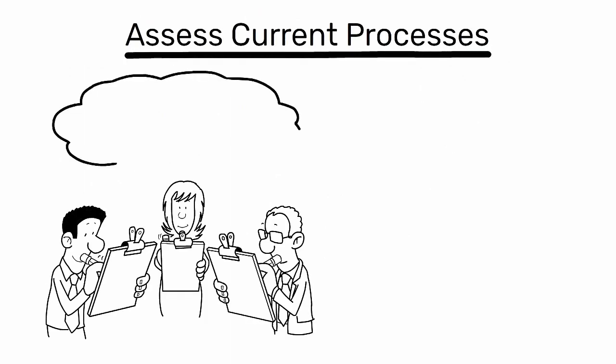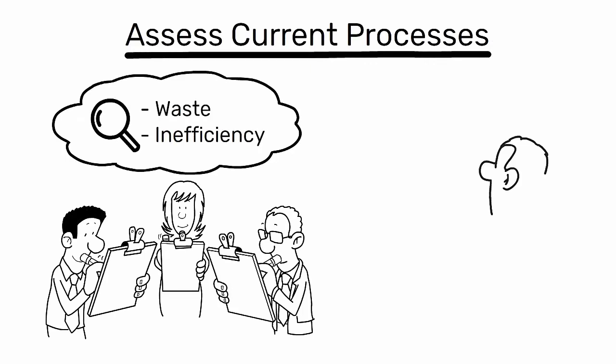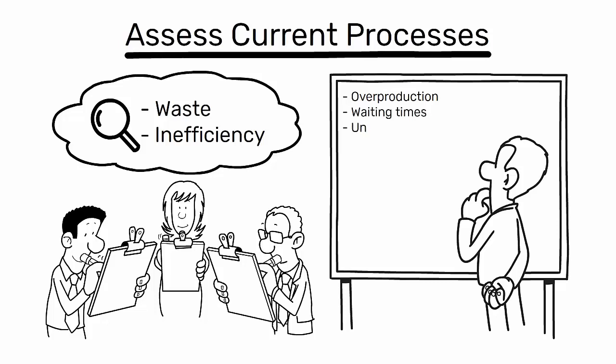Second, assess current processes. Conduct a thorough assessment of current construction processes to identify areas of waste and inefficiency. This could include overproduction, waiting times, unnecessary transportation, excess inventory, over-processing, defects, and underutilized talent.